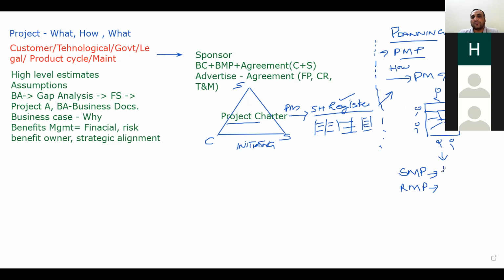So in the scope management plan, we will set how the scope is prepared. In the requirements management plan, we will set the strategy of how we will collect requirements from the stakeholders: by brainstorming, by facilitation, by focus group, by questionnaire, by surveys, by interviews, by showing a prototype, by benchmarking, by cost benefit analysis, by showing a matrix diagram, or by using any other tool like context diagram, affinity diagram, mind mapping. And if we have conflicts, we can do group decision making.